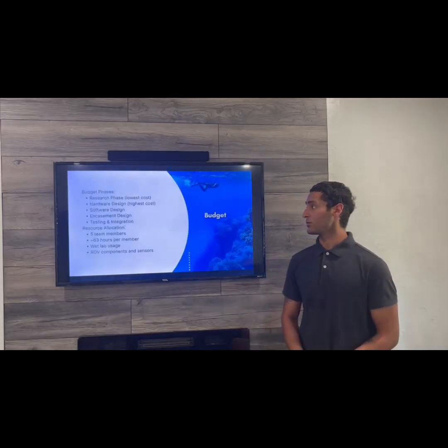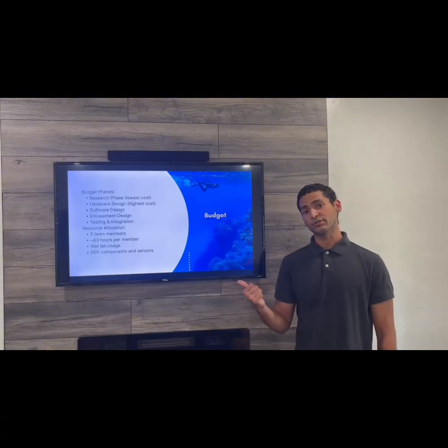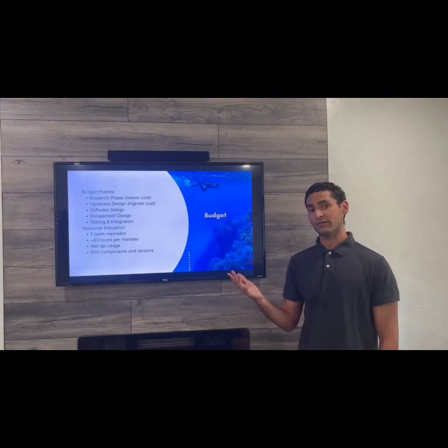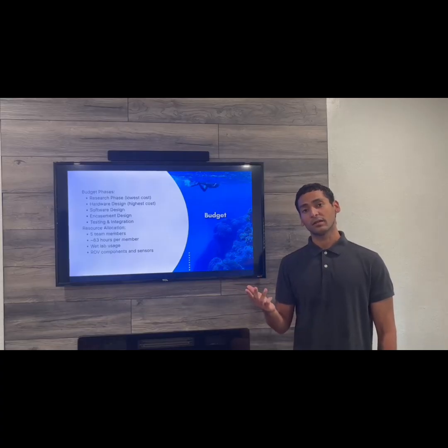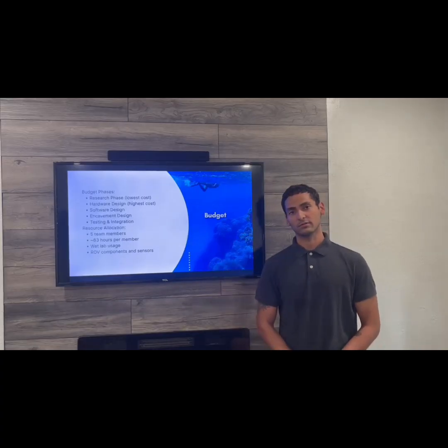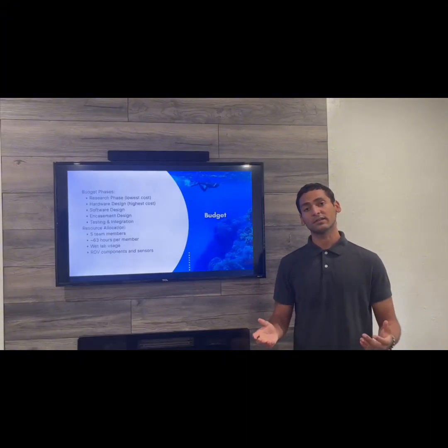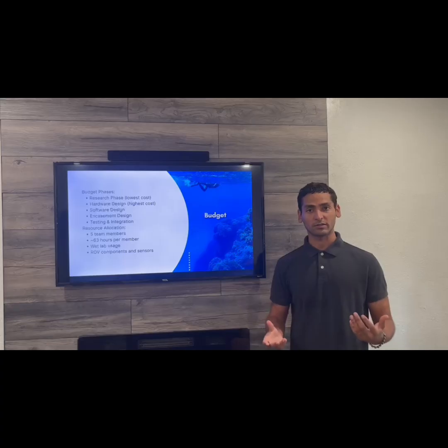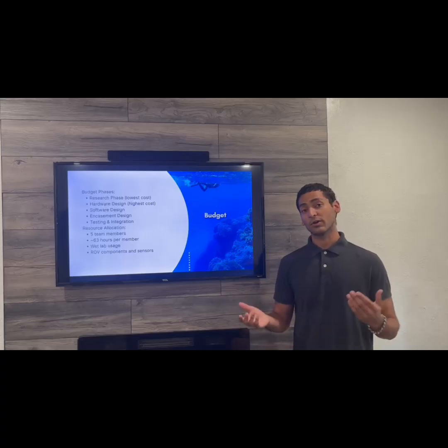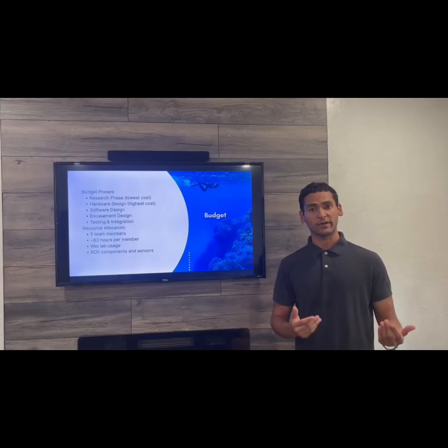For our budget, we broke it down into 5 phases: our research phase, our hardware phase, our software phase, our implementation phase or encasement phase, and finally, our testing and integration. To start off, our research phase is our lowest cost, because in this phase, we will focus strictly on collecting data on other products, on other designs, where these products or designs excelled and where they failed.